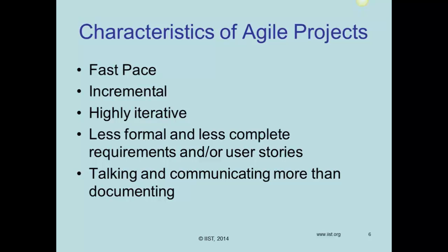As you probably know also, Agile projects are highly incremental and highly iterative. Let me just take a minute here to distinguish between the two and tell you the difference, because I've seen many people confusing the two. Incremental means that we're not going to implement a large set of functionalities all at once, but rather we are going to break the functionality that we are supposed to present to our customers into segments, into increments, or into sprints.